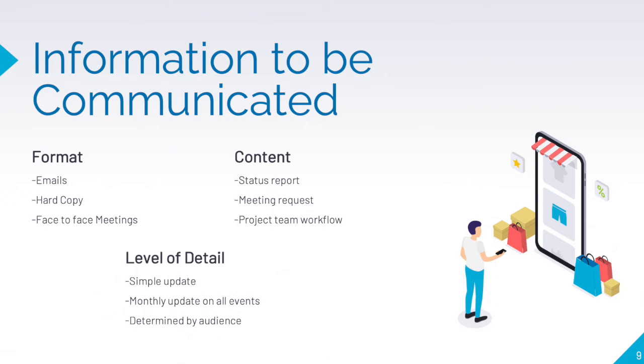As an example, an email can contain a meeting request, which is simple info stating when the meeting is for, and during the meeting a hard copy of a status report can be given with great detail so that it can be passed around for the meeting attendees to see the report and then ask questions that may come up.